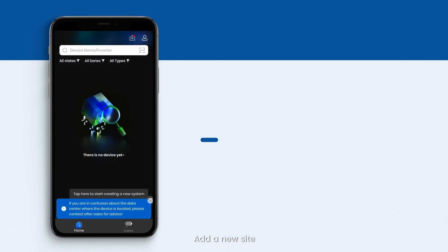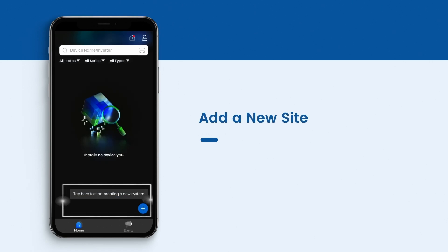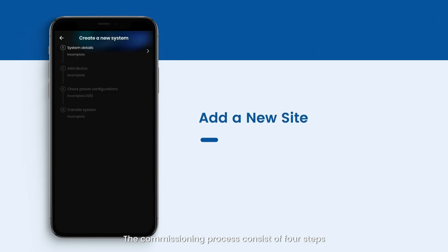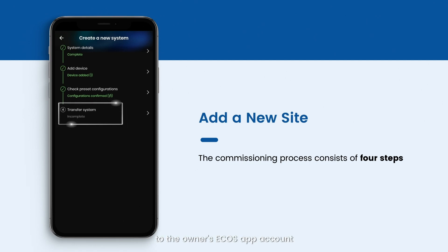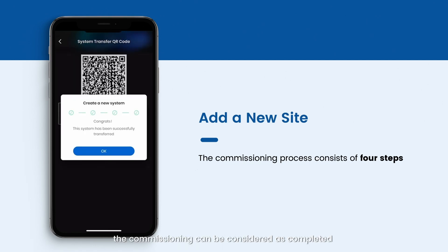Add a new site. The commissioning process consists of four steps. Only after transferring the site to the owner's Ecos Hub account, the commissioning can be considered as completed.